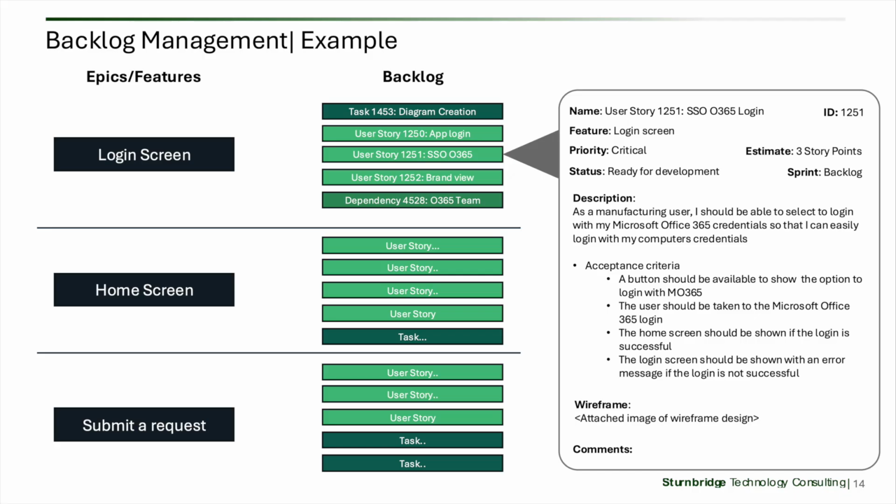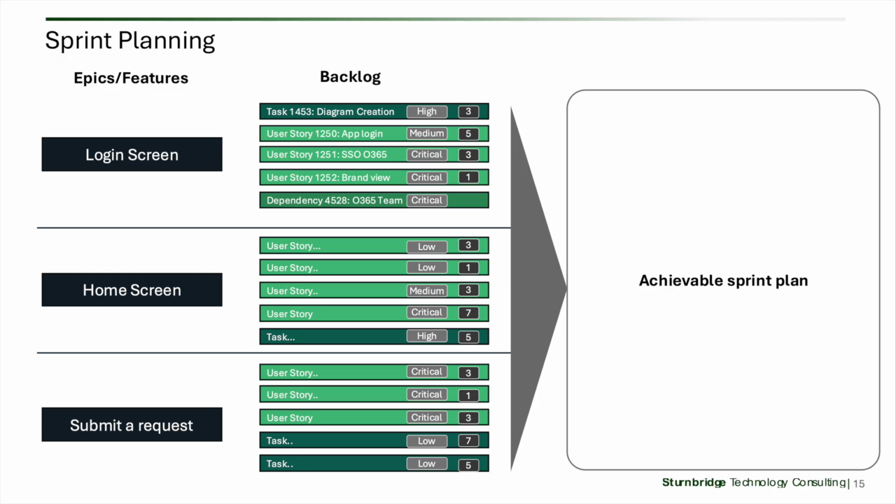Backlog discipline has a direct effect on sprint execution. Teams with unclear backlogs spend sprint time reinterpreting work, clarifying missing requirements, and resolving avoidable misunderstandings. Teams with strong backlogs are able to move faster with more confidence and less friction. That takes us into sprint planning.